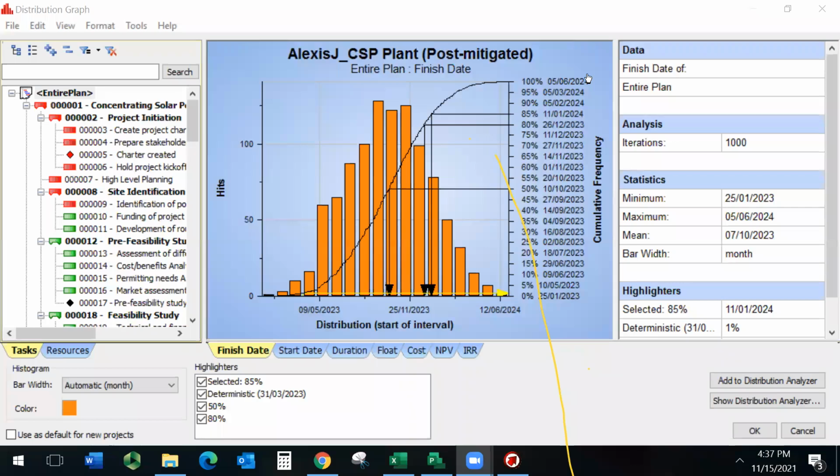Well, before we built the impacted risk plan, we didn't link the risk to the WBS item yet, and we didn't build that plan yet. So after building the plan, when we rerun the risk analysis, we see the effect of the risk on the completion date of the project.